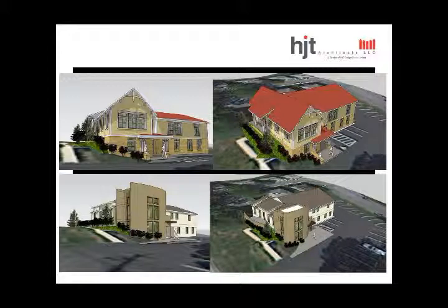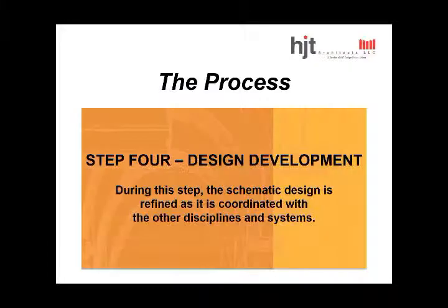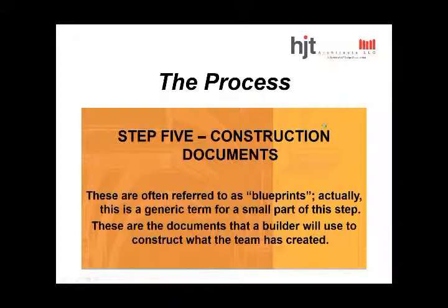Next in the process is design development. That's where we take the client's ideas that have been converted into schematic design, and we refine those. We talk about bringing in the disciplines of mechanical, electrical, structural, and plumbing, talk about areas of finishes, and materials, what kind of materials are going to be in the floors, the walls, the ceilings, and help you through that decision-making portion. Next is the all-important step often referred to as construction documents. Most people call them blueprints.